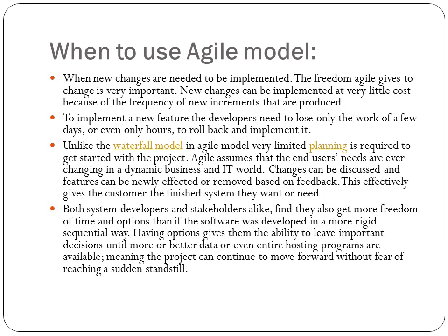something to delete a piece of code that has already been incorporated. And the next one is, unlike the waterfall model, in the Agile model very limited planning is required to get started with the project. This is because it has very short iterations. Agile assumes that the end user's needs are ever changing in a dynamic business and IT world. Changes can be discussed and features can be newly added or removed based on feedback. This effectively gives the customer the finished system they want or need.